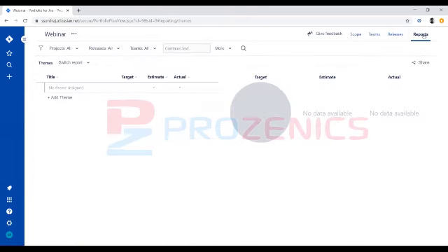I don't know how many of you are clear about investment bucket based planning. There is an option to see how much we invest based on new development, enhancements, maintenance, and so on. There is a setup called theme in Jira. The first thing is you need to set up the kind of investment bucketing system. So it is like new dev, maybe I target it for 45%.